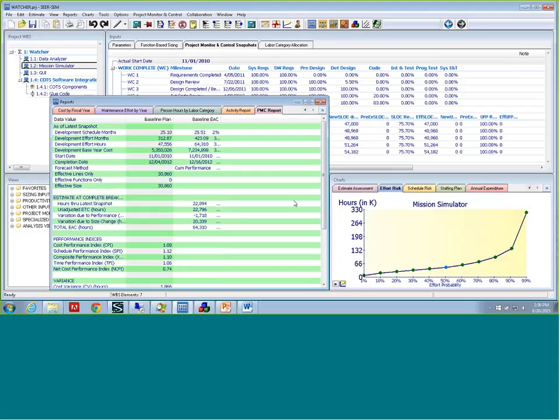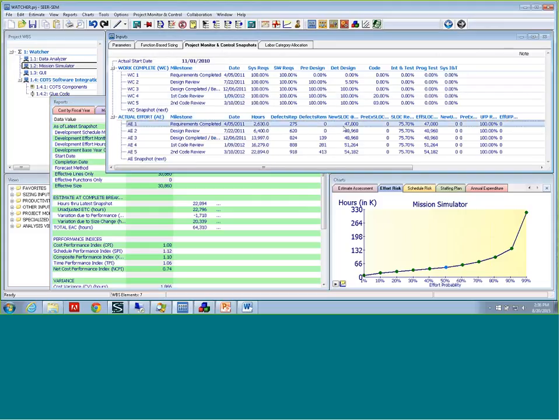Am I right? Yeah, in a roundabout way, yes, because SEER will give you the estimate, which will ideally lay out in Microsoft Project. Now that you have the activities and the resources defined in SEER, we know how much of it is requirements and the different activities, then we lay it out. We have an integration directly into Microsoft Project, so it'll lay it out according to your resources and your project plan. If you track inside Project, then we just have to collect totals at this point. But yes, we have a natural integration into Microsoft Project. It's Microsoft Project integration for SEER SEM in this case.